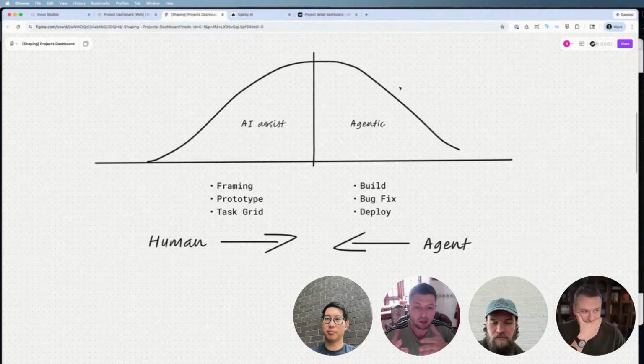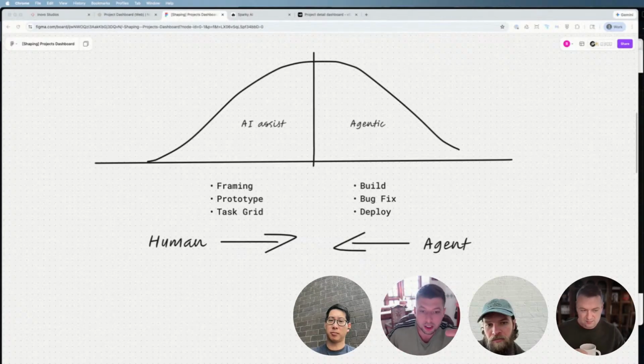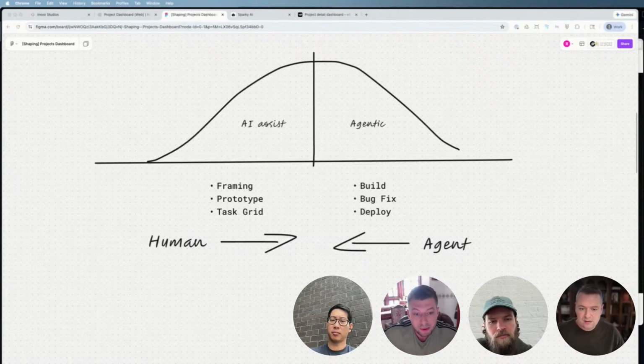And especially for this project, and I think this project had one very interesting characteristic, that we had many components and none of them were related. So basically, the bulk of the work was done in parallel, meaning I broke the project down into small components, meaning the estimates component, the orders component, and each component had its own .md plan for me to implement.